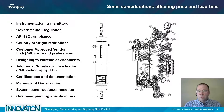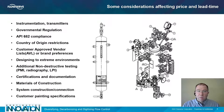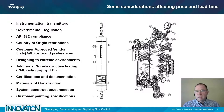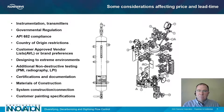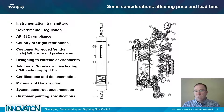Materials of construction are also an important consideration. More and more, we are seeing requirements for exotic alloys in specifications. It's important to note that these alloy markets are very volatile and prices are changing daily, weekly, and monthly. If you do require exotic alloys, it's important to understand that the availability and price of these components will be significant and change over time.